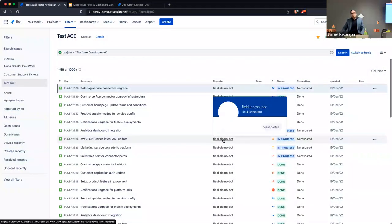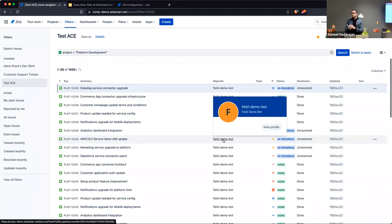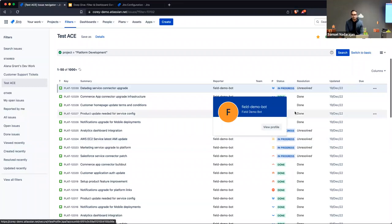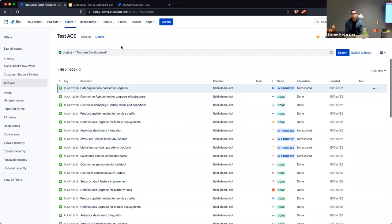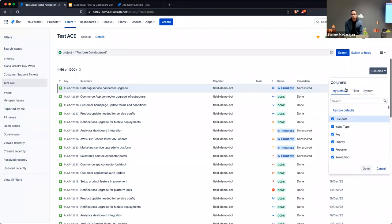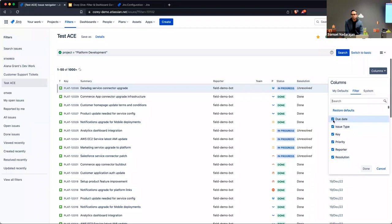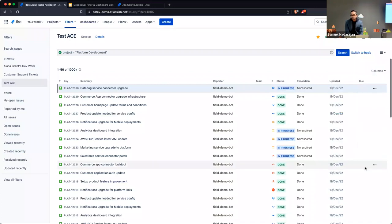One scenario I've run into multiple times is people will create multiple filters, and certain fields are relevant to some filters but not others. People find it a pain to rearrange columns for each filter they pull up. What's nice is once you create and save a filter and pull it up again, you'll see another option in the columns dropdown called 'Filter.' Clicking that tab lets you control which columns appear specifically for that result set.